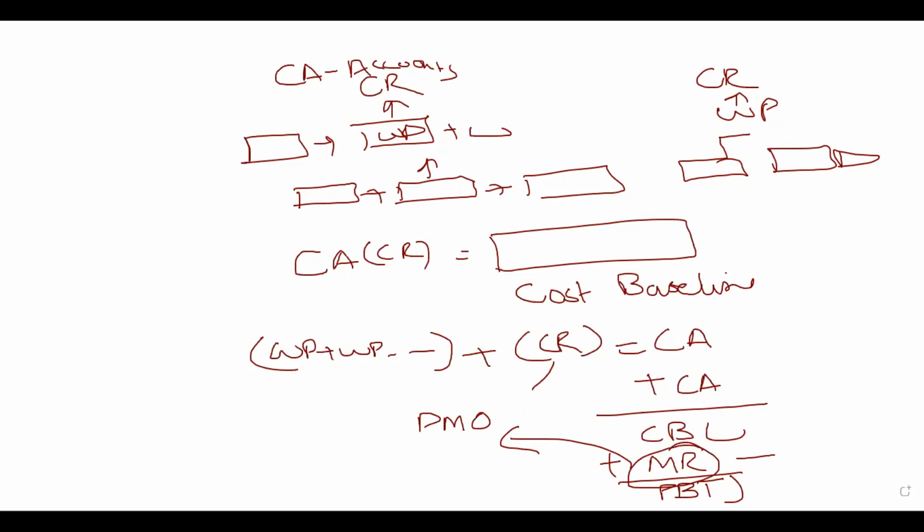Apart from that, we need to do earned value management in short. So I will repeat the earned value management for all of you, so anyone can watch. To perform earned value analysis, we have three variables. Planned value, also called budgeted cost of work scheduled. Earned value, also called budgeted cost of work performed. And actual cost, also called actual cost of work performed.